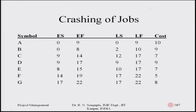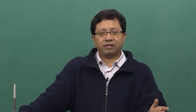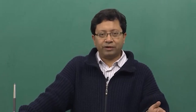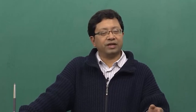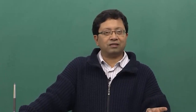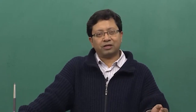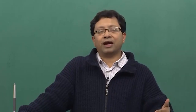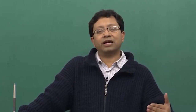Now consider the data given from two points of view. In the CPM concept, the fixed time is given directly. In PERT, you have optimistic time a, pessimistic time b, and most likely time M — from these you find the expected time. As you find the expected time for each job, you also find the variance for each job, always remembering that variances can be added along the whole critical path because activities are assumed independent.